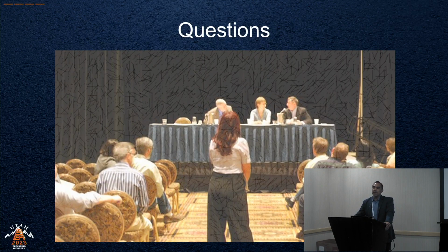Well, and to add on to that, a lot of the reasons we change at the district level, when I was at the district level, is that we don't really review things fully until 90%. Because there's so much other stuff. And trying to really get a good constructability review on something that's in 2D is not easy to do, even for seasoned inspectors. So if we're at 90%, we're like, well, how are we actually going to do this portion right here? We don't know. So that's where we have to redesign this.